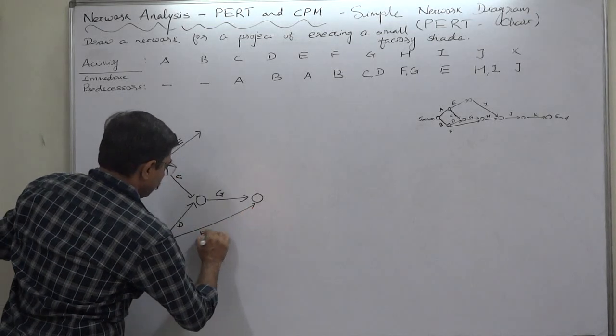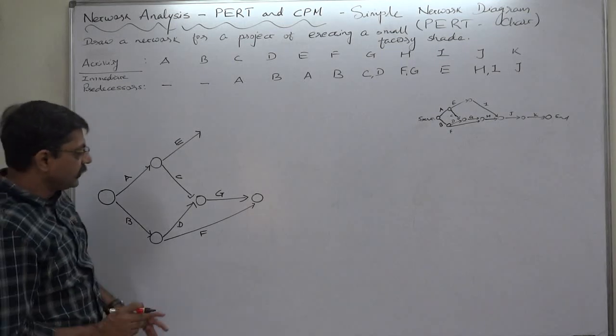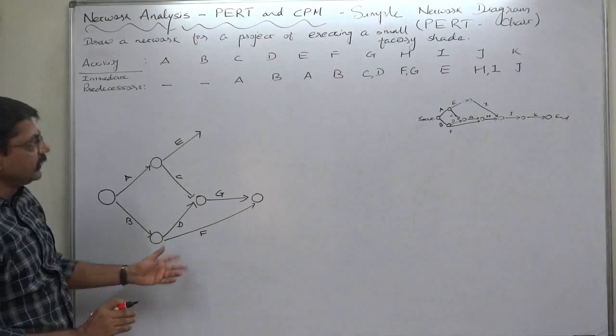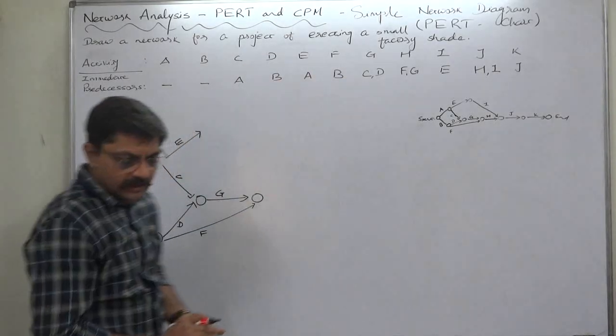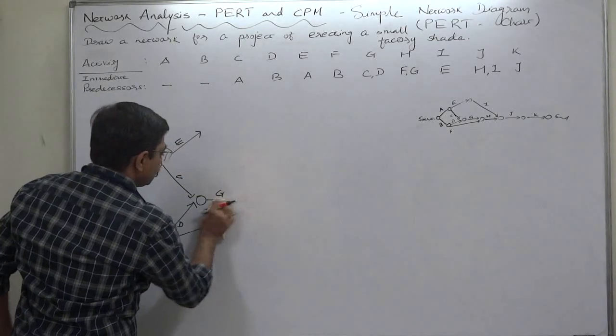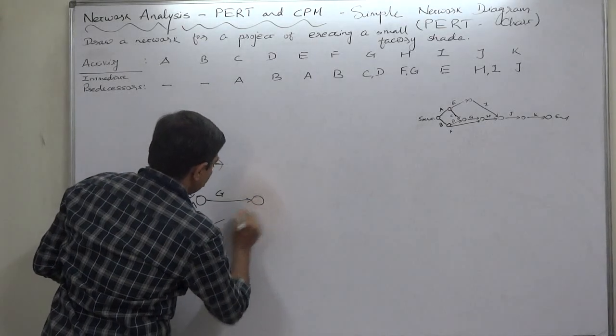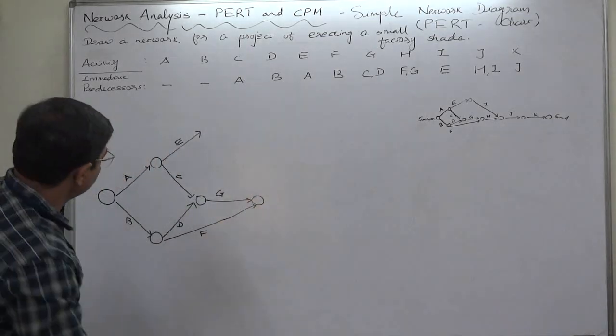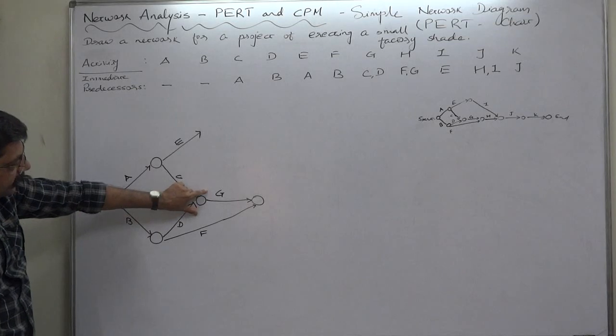So it is not compulsory to draw F first and G in order. It is not compulsory to maintain the alphabetical order—we can go according to our convenience. Yes, I am just changing the direction. This is a merge event, this is an example of burst event, this is also an example of merge event.